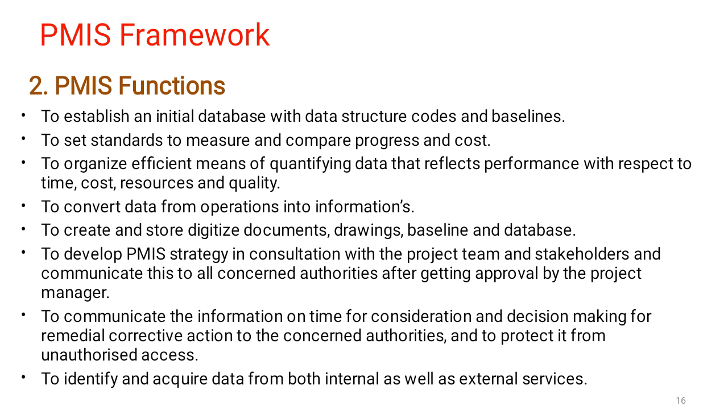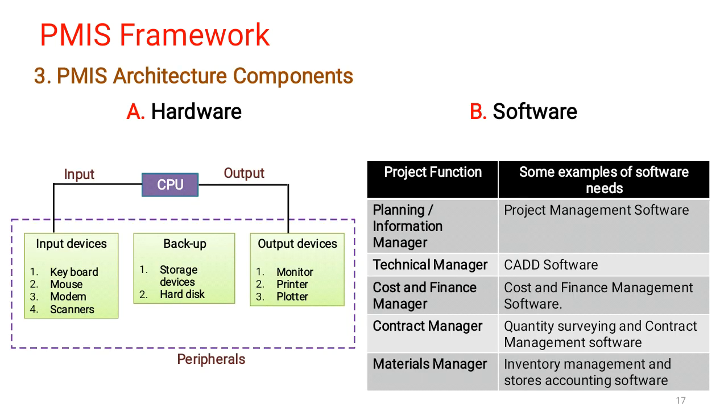To establish an initial database with the data structure, code and baseline, and to set standards to measure and compare progress and cost, to organize efficient means of quantifying data that reflects the performance with respect to time, cost, resources, quality, etc. I'm not reading everything. You can go through it in detail. So these are some of the essential functions of a PMIS, what it has to perform.